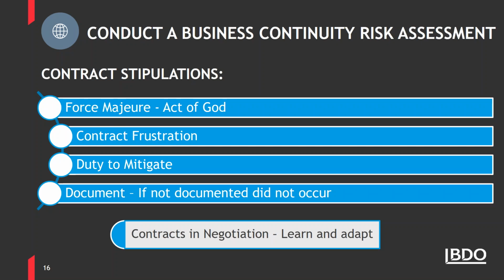So check your contract terms to understand the specific definitions of what is a force majeure event or allowable delay and what is not. The occurrence of a pandemic will typically not be sufficient for a claim on its own. There must be an actual delay, and there must be a direct causal link between the event and the specific work. Typically, the event must render the work impossible to perform.